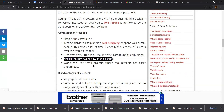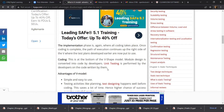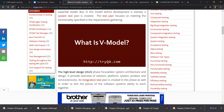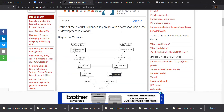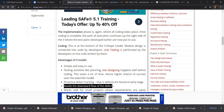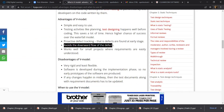V-Model works well for small projects where requirements are easily understood. For larger projects, there will be a lot of complexity — validation at every phase requires interacting with all the people all the time. For short-term projects of maybe six months you can engage all the experts, but you can't engage experts for five years — unnecessarily a lot of money, human resource and time is wasted. So for smaller projects, V-Model would be recommended best, but for larger projects, some other models may be more appropriate.